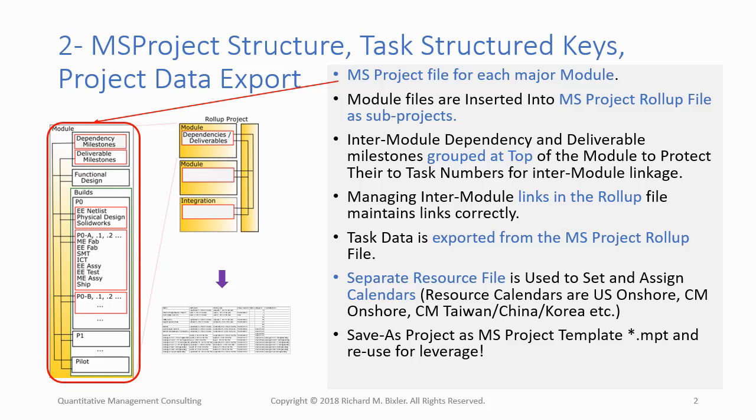Second, below links in and links out, a section for functional design containing GANTT representing the design story for all design revisions, sprints, etc. for one of several elements. Third, a section for common and repeated large processes. An important example shown is EE or ME build process for revision of each element through its development lifecycle, including back-end design, DFM reviews, fab, CM build, assembly, first article inspection, test, and ship. Your project may have a different set. A template for this can be well designed and built for a key repeated process, which is replicated and customized for specifics of each specific build.